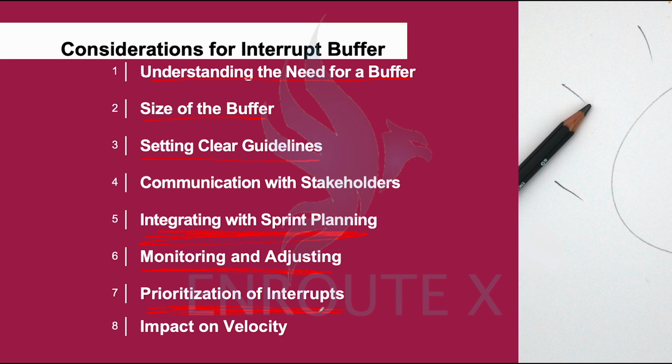And lastly, you need to check the impact of these interruptions on your velocity. So as you are developing further, you will be checking the impact of the interruptions, and you are recalibrating your velocity time and time again.